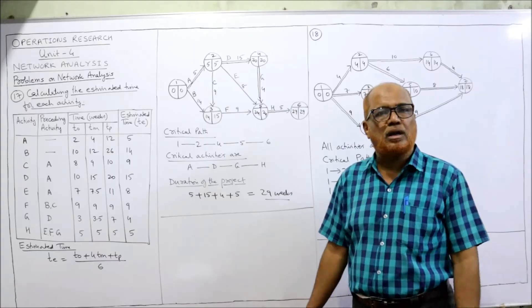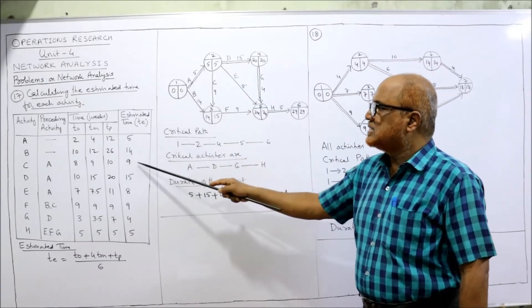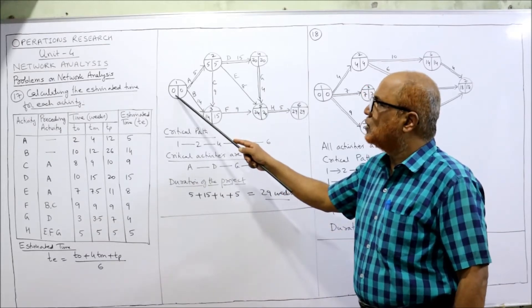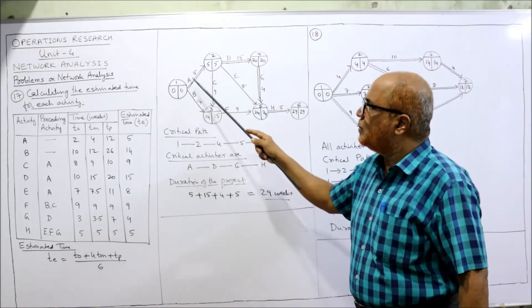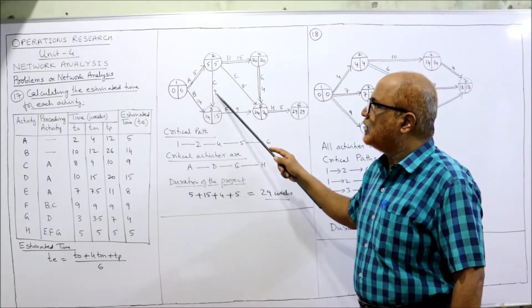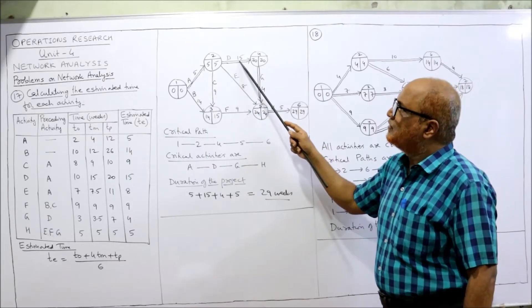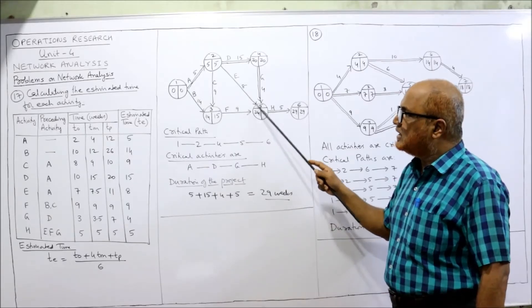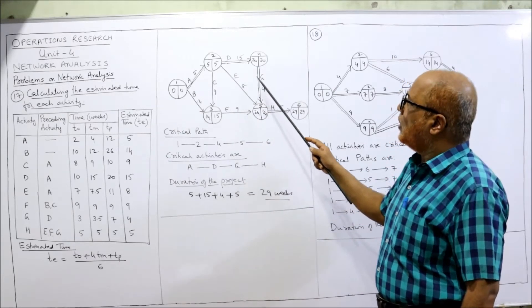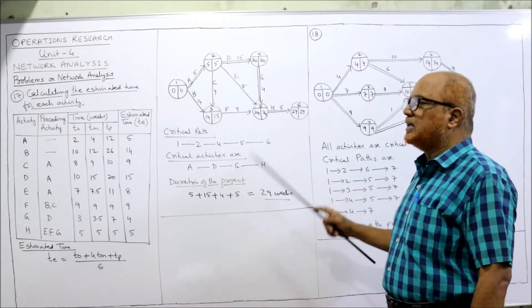Take the estimated time for each activity: A = 5, B = 14, C = 9, and so on. For the EST forward pass, the first EST is 0. Adding 0 + 5 = 5. Where two activities merge, take the maximum: 5 + 9 = 14 or 0 + 14 = 14, so 14. Then 5 + 15 = 20. Where three activities merge, take the maximum: 14 + 9 = 23, 5 + 8 = 13, 20 + 4 = 24 — so 24 is highest.